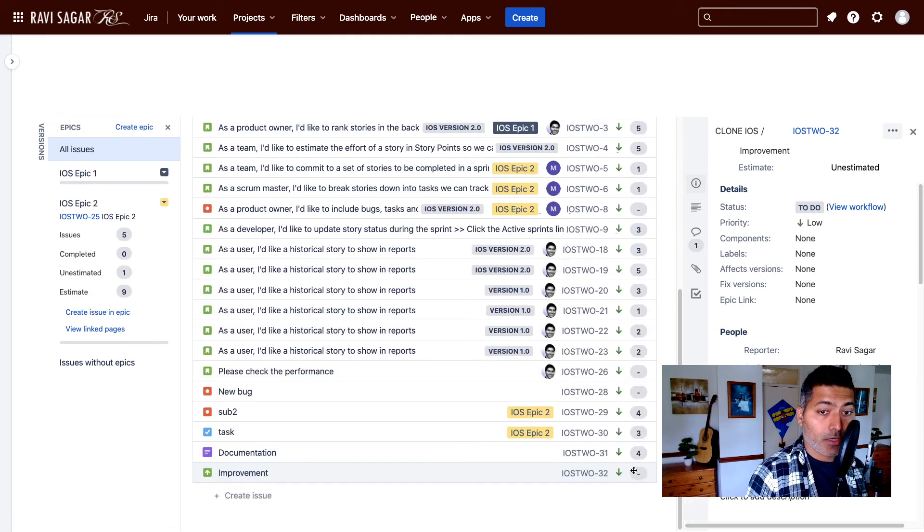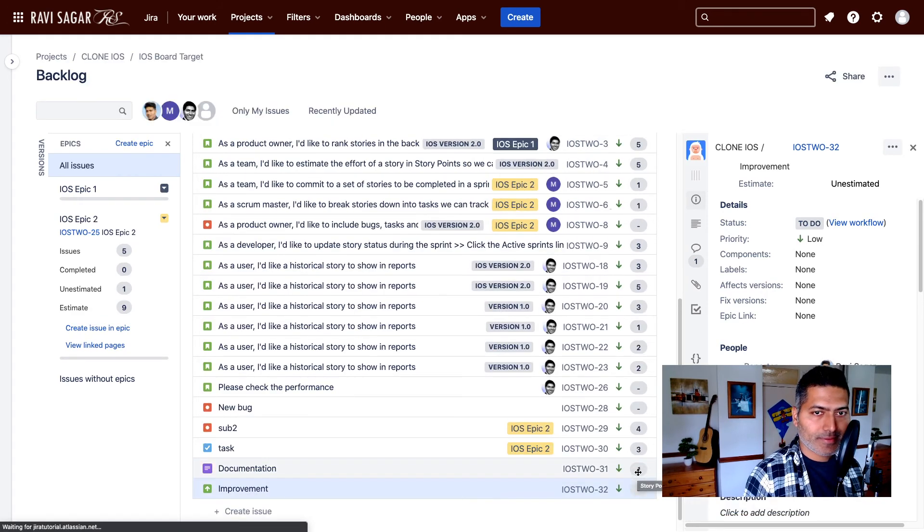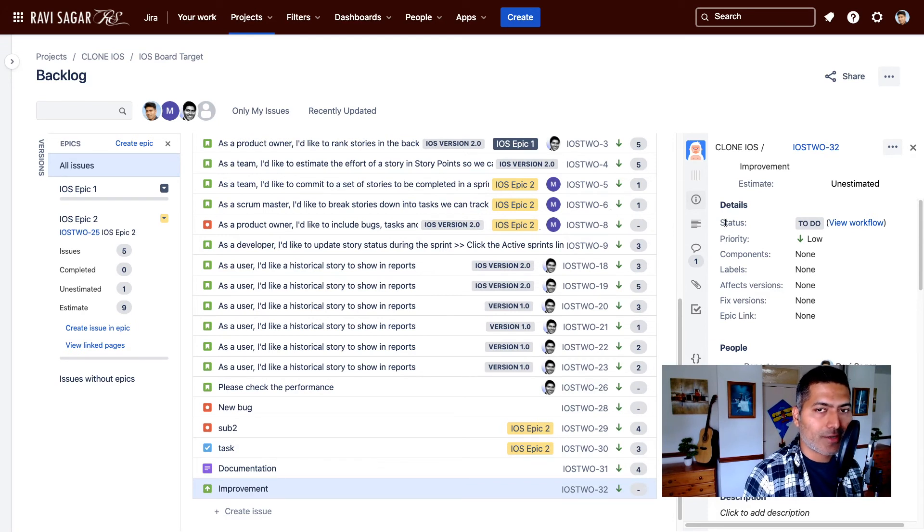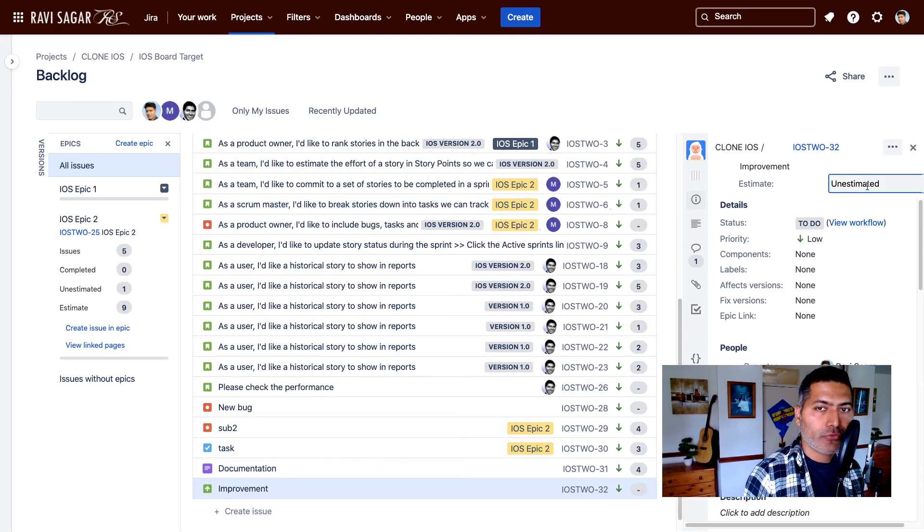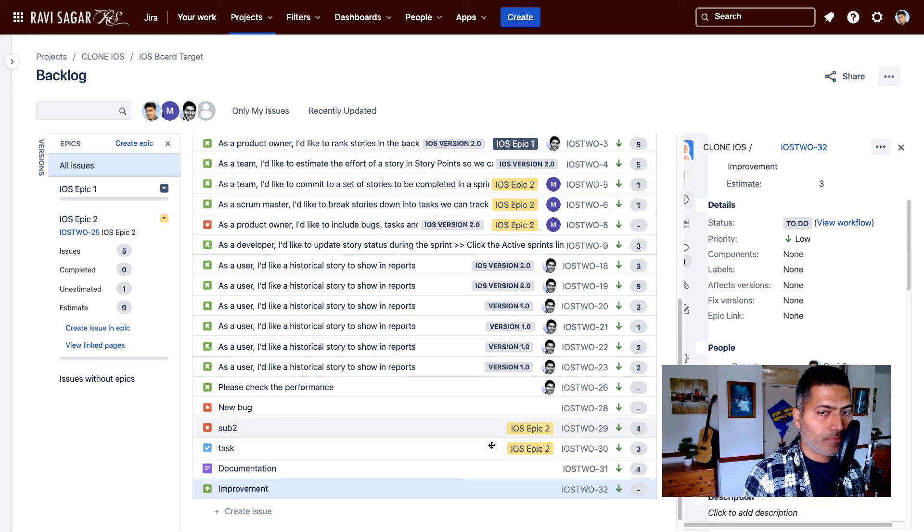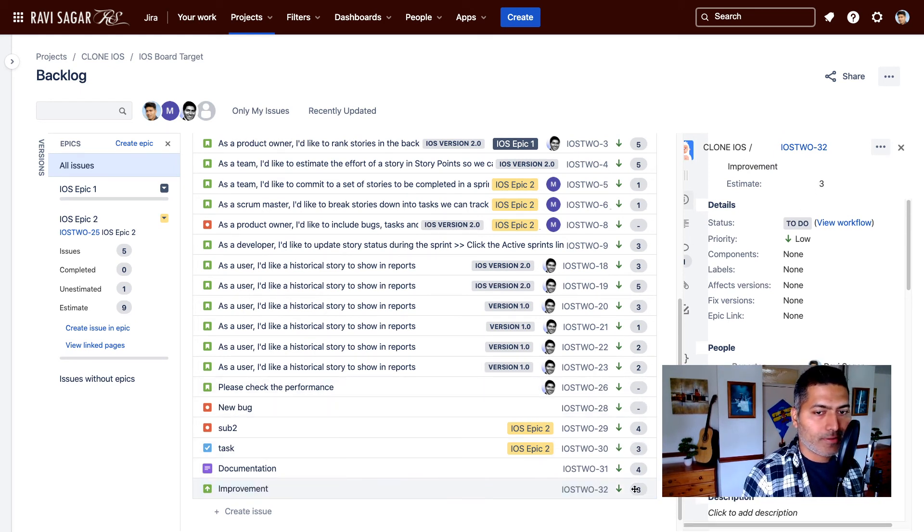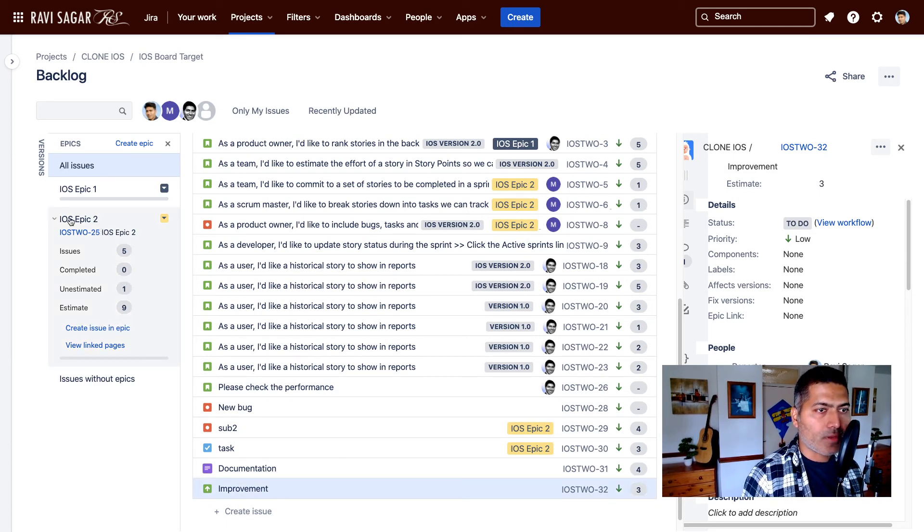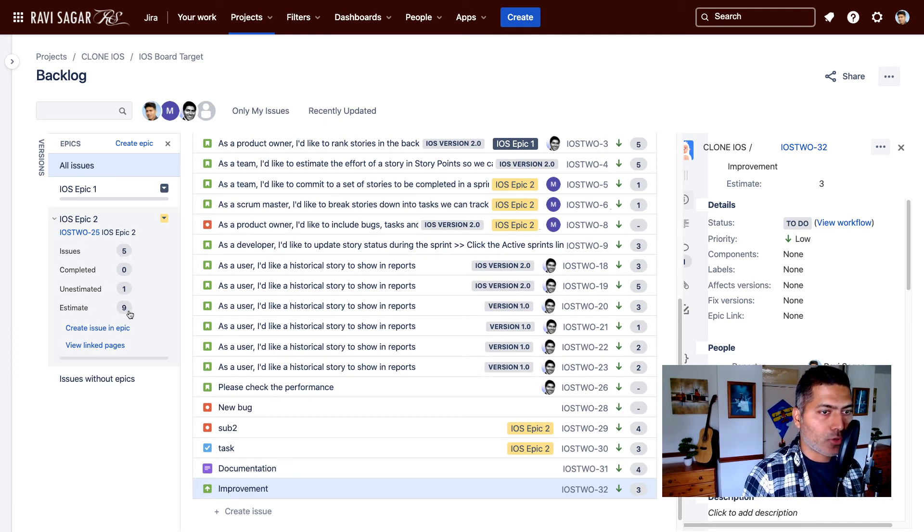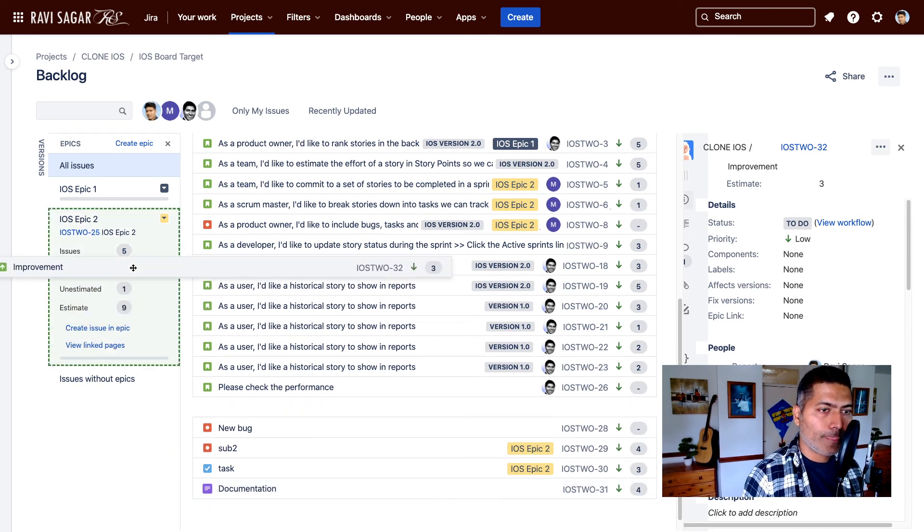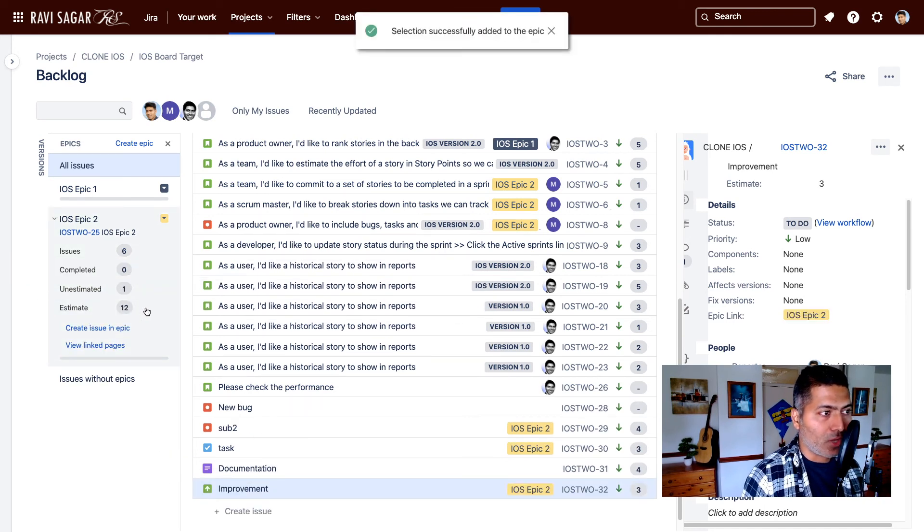So now we have this story points field, also not a new field but this story point field also applicable for my improvement issue type. So I can estimate. You can see the number here. I can also add it to the epic right now. Let's say you want to add it to iOS epic two where based on the current issues the total estimation is nine story points. If I add three more it will become twelve.